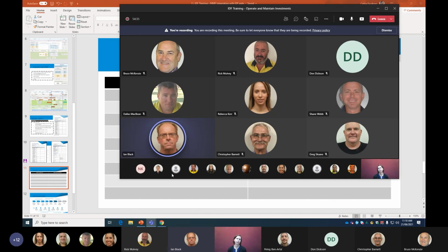Yeah. So absolutely it's being thought of. Under the IDF, it's mandatory to complete a stakeholder engagement plan. So you actually identify your stakeholders, and that's right at the identify phase. Once you pass gate 0, the initial "I've got an idea", the very first step is that stakeholder engagement plan. Who are my stakeholders? And then obviously working it out.